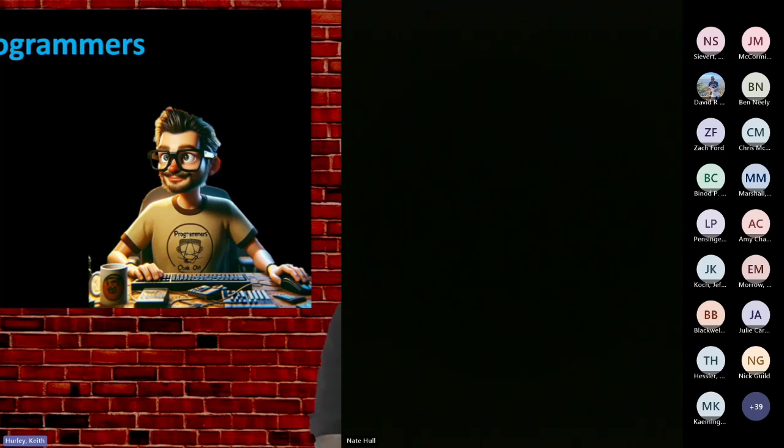Here's some canaries in the coal mine I'm going to tell you to look for when you're trying to find groups to work with. First off, try to find a development group that wants to include some sort of a visioning process. When you start making a database, obviously at this point you've talked to your end users, you've made a list of what you want the database to do, you've gone out, you've bid a contract, you get it back. Look for those groups that still want to sit down with your end users and say, how does this work? It might be things like use cases, user stories, wireframing, a lot of different methodologies that may be used, but any developer group that wants to do that means they want to understand your processes. They want to make sure what they create fits into your workflow and your data flow. So groups that want to do that are a very good sign.